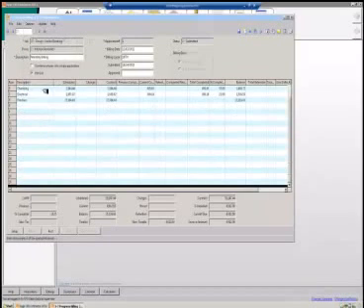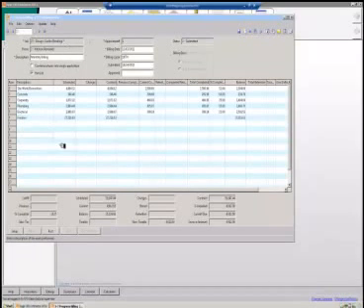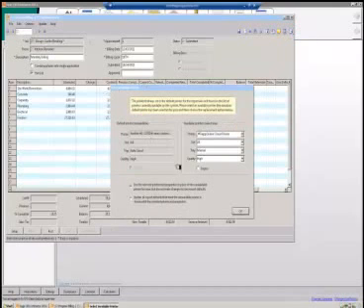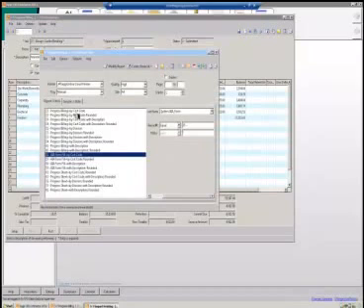I'm sure you can figure this out. What it's going to do is create another one just like this, except it's application number 2 with new dates. It's going to take what's in this column and add it to whatever's in the previous column, leaving this column blank, so now I can enter in what I want to bill for this month. There is a whole lot of different ways to bill this, so I can bill by cost code rounded up, and I can decide how far I want to round up. I can bill it by cost code with a description, etc.